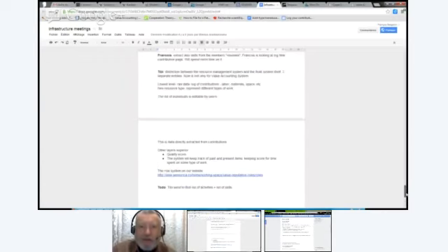So we found an algorithm that was a lot simpler, that was not optimal but was good enough. It was within a couple of hairs of optimal, but it did not change everything all the time. It gave you a stable schedule unless something really major changed. For minor changes, it would not flail everybody around and drive them crazy. So there's a bunch of trade-offs with optimal and good enough. Usually simple and good enough is better than optimal and complicated, where nobody can understand what's going on and you get crazy results. It might be optimal, but it just drives you nuts.